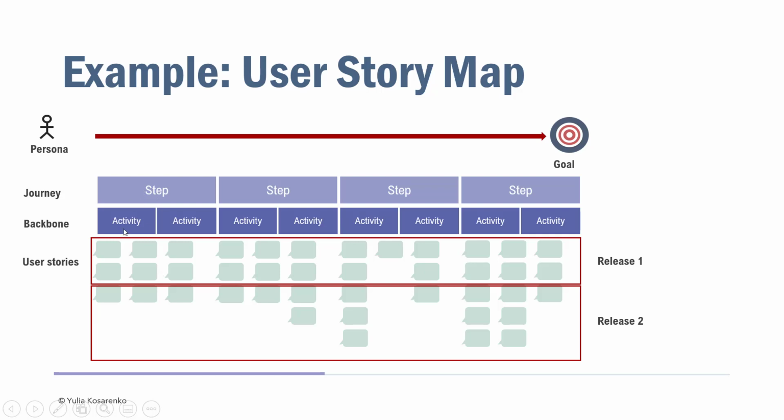In a user story map, you can arrange it visually like that, so it looks a little bit hierarchical. And your horizontal layers can represent different releases. So this way you can define what minimum functionality you want to fit into release 1. For example, you want to implement this user journey in its simplest form, and these are the user stories that will together make up that first release, and then the next and the next. So this can be a planning tool as well, and this also shows you the structure of your user stories, and it helps you see the relevance of different stories and determine if you need to move things around, what can move, what needs to stay, and what is the overall sequence.